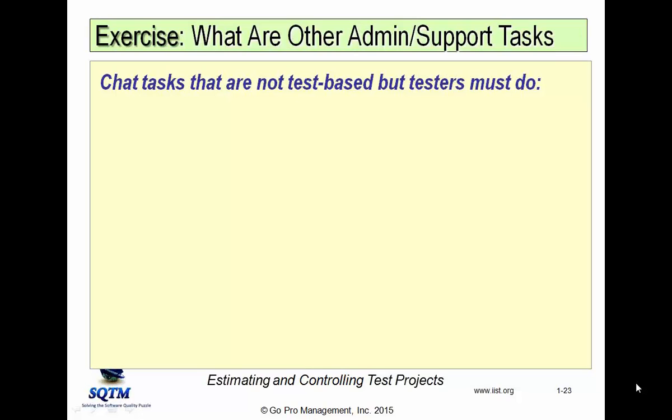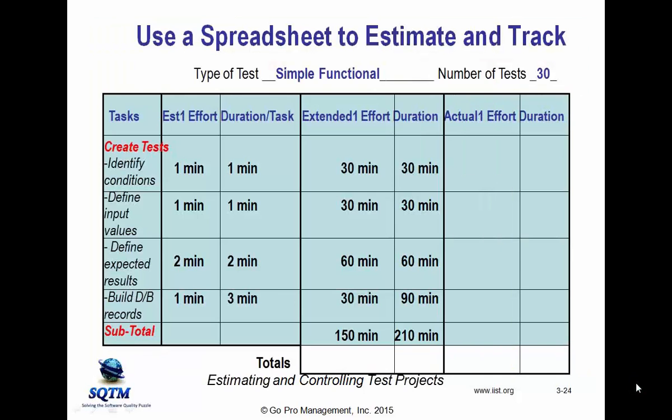Status reports, creating your test environment. Okay? Anything else that anybody can think of? Okay. You know, if you've got meetings, if you've got training, if you've got tools, setting up tools, learning about them, okay. These are all time-consuming activities that are not a function of the number of tests that you've got. Okay.